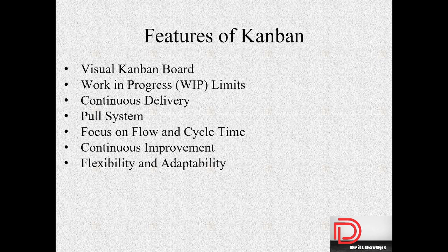This is unlike a sprint. In a sprint, even if you complete each piece of work, all the work of all the individual people is delivered towards the end of the sprint instead of the middle of the sprint. Here it is not like that. The work that you do or complete is delivered then and there, and the people who reported that issue can see the change or resolution immediately once it is completed. That is what continuous delivery means.